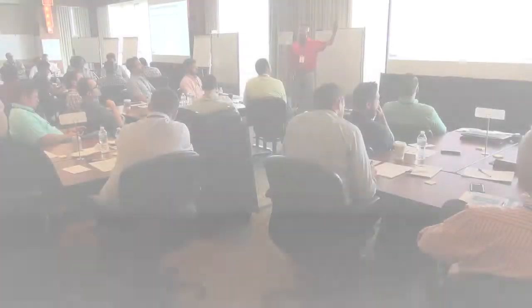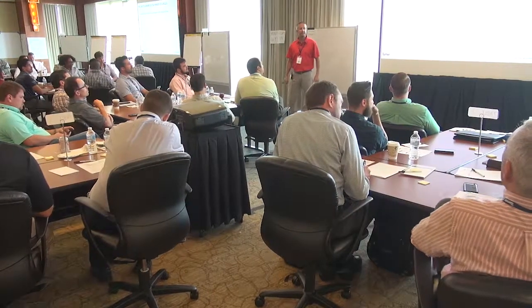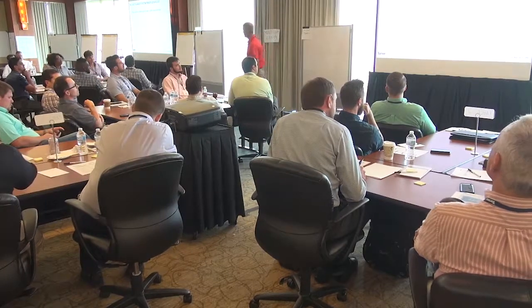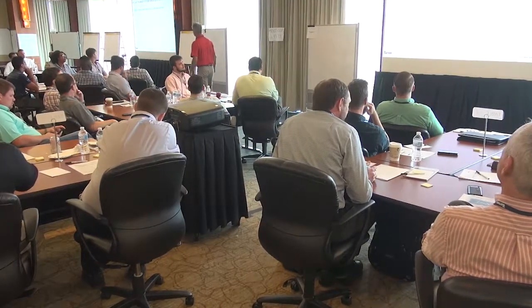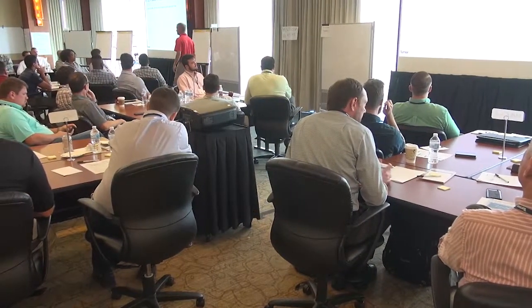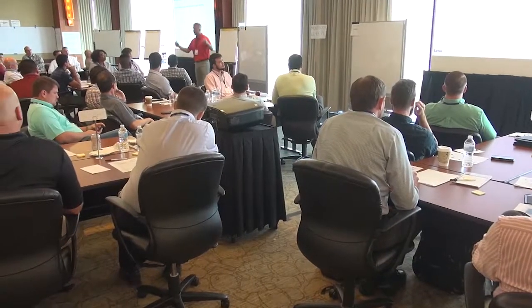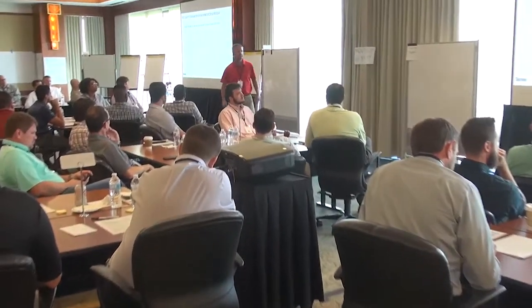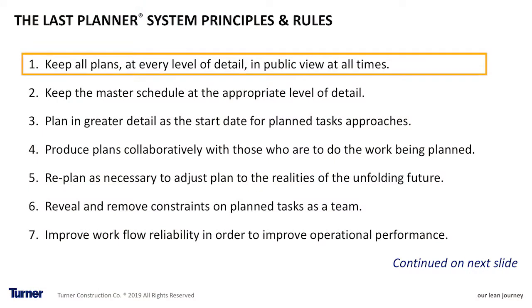So we're gonna walk through, at a high level, the principles and rules for the Last Planner system. And then we're gonna get into much more detail and practice. First one: keep all plans at every level of detail in public view at all times.